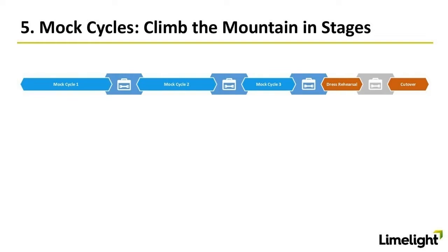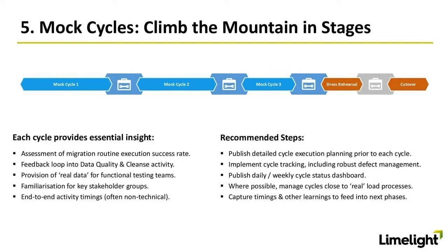So in terms of what we see about that, the insight that people are focused on is not just the first one, which is often the classic one, i.e. learning how successful our migration routines are, but there are other opportunities to gain value from these cycles as well. They're an essential feedback loop into the data quality and cleanse activity. Brian referenced that earlier. Every time we run a mock cycle, we learn something about the quality of our data that feeds back into the plans that we had to assess and cleanse or enrich that data.